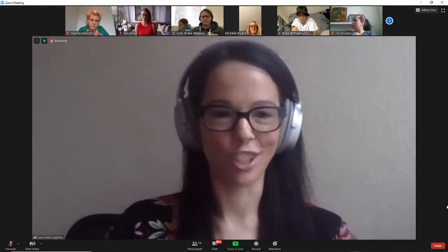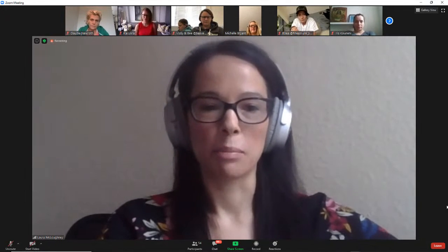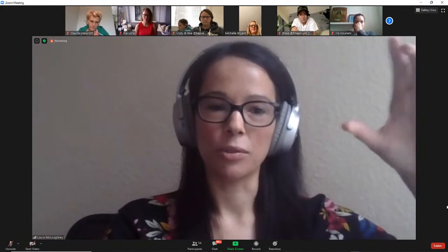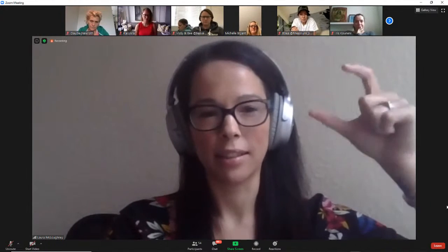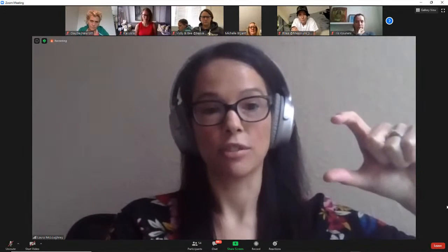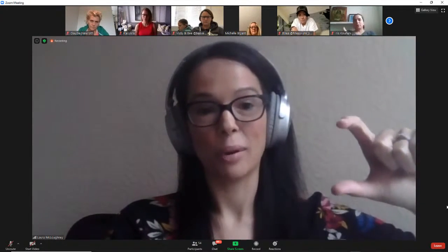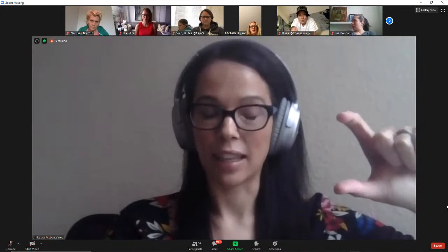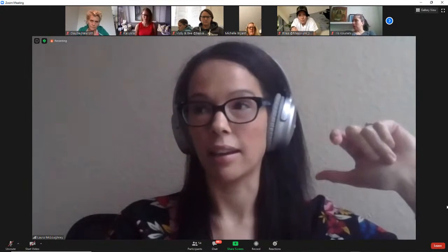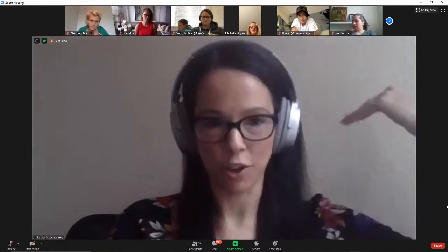So that percentage is useless. But again, having the contingency in there that Claudia talked about before makes sure that those numbers and how you calculate them are independent of each other. So your bill costs are rooted in as X, your professional fees as a gauge, as a percentage of your bill cost, but knowing that isn't necessarily including all of that. Like I wouldn't include my connection fees to electrical costs in there, for example. That would still be another line item.